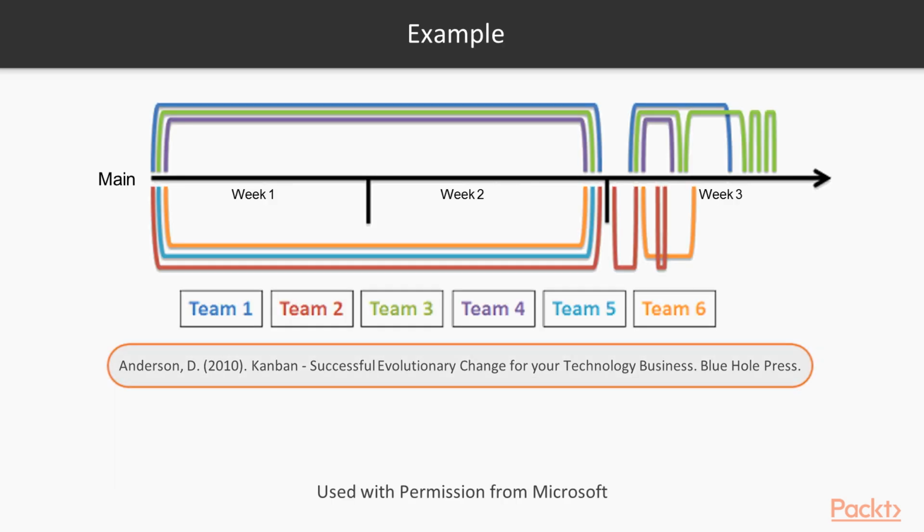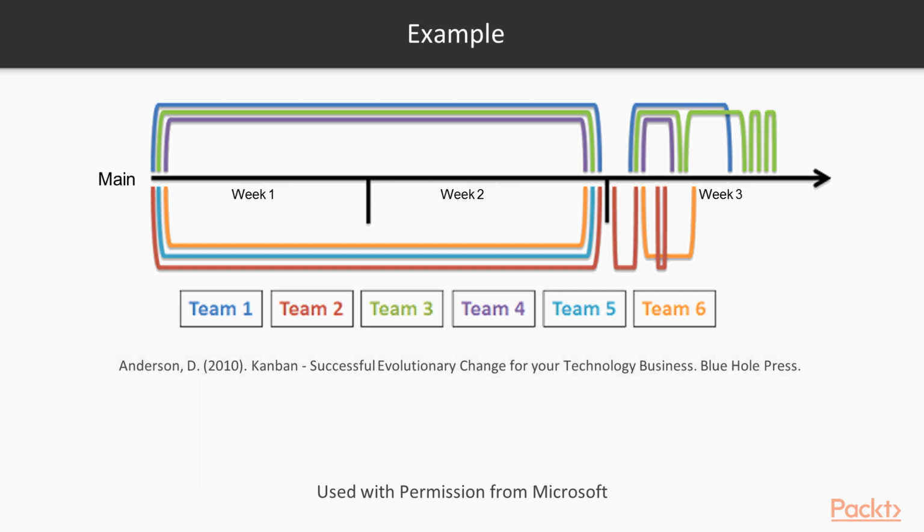Typically, most organizations will be based on this 2-week sprint. And what I'm seeing in some organizations is that they then use week 3 as an integration week with all the other teams. So in this simple example, where 6 teams are working simultaneously in some kind of scrums, as you can see, different teams are working on different items in week 3.